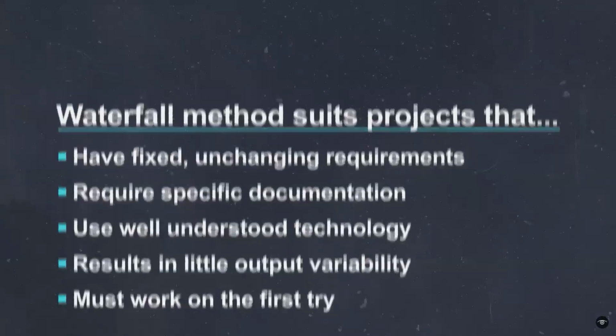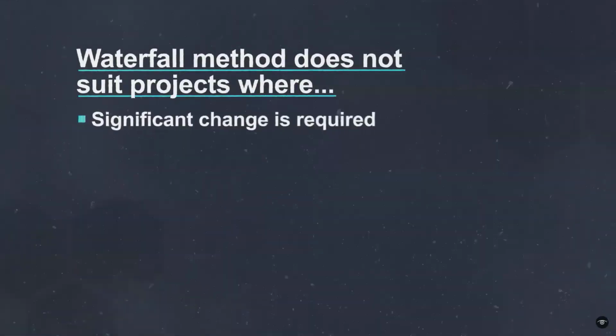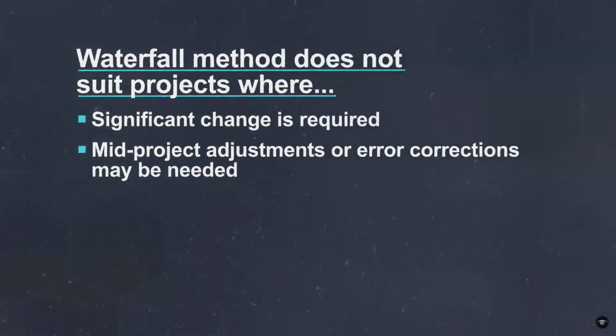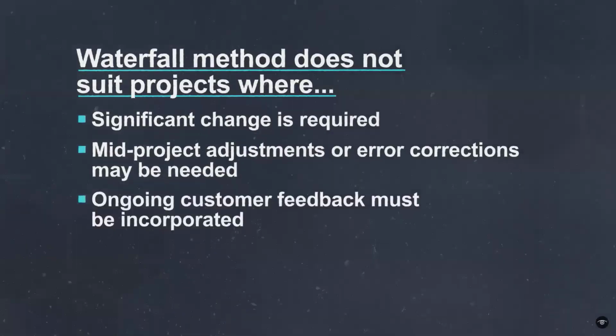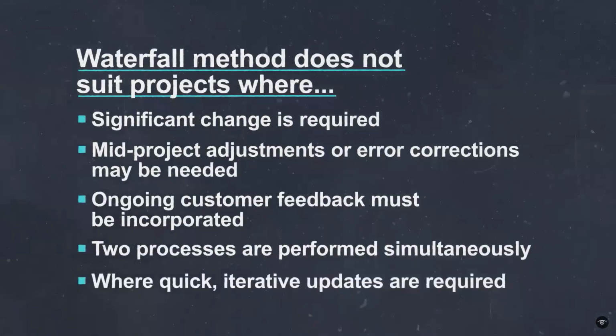The waterfall method isn't ideal for some projects, such as ones where significant change is required, mid-project adjustments or error corrections may be needed, ongoing customer feedback must be incorporated, two processes are performed simultaneously, or where quick, iterative updates are required. Development teams may choose other methodologies like Agile or DevOps because of the increased flexibility they allow.